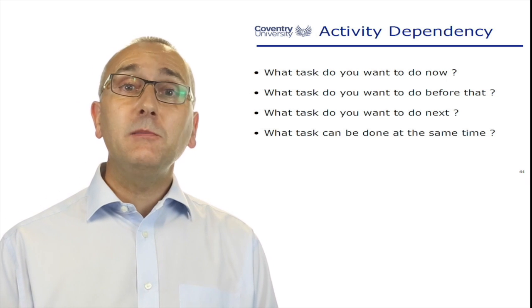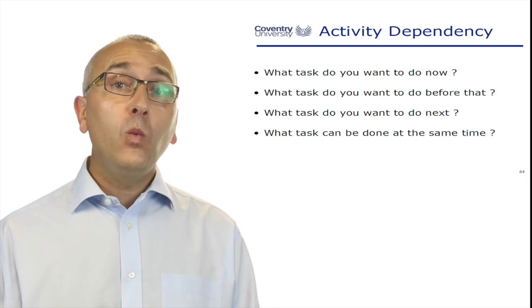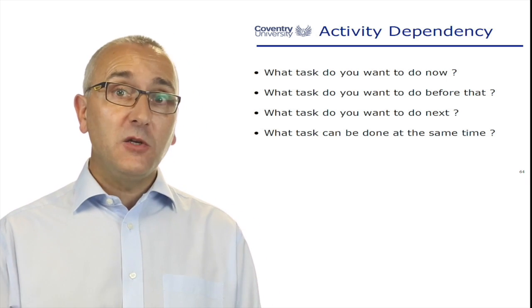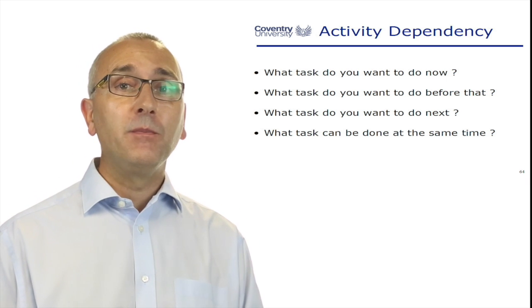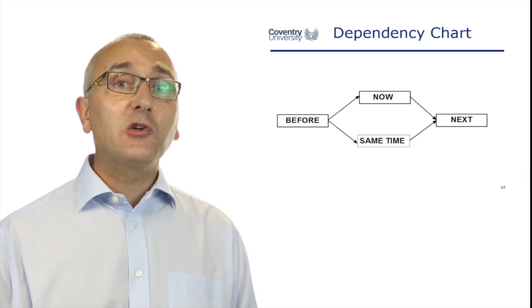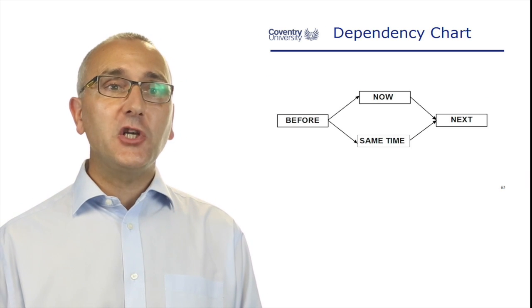To do a dependency chart, we simply answer these four questions: what happens now, what can be done before, what happens next, and what can be done at the same time. We're simply going to create a dependency chart of those tasks.